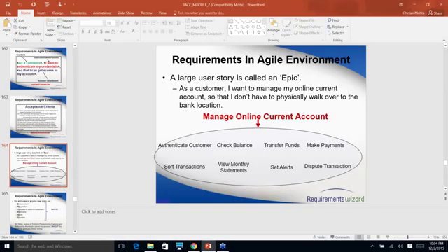So here I'm saying manage online current account. So you can authenticate customer, you can check the balance, transfer funds, make the payments. You can do the sorting, right? You want to sort your transactions based on the dates or based on different types of transactions. All those things you can do. You can view your monthly statements. You can set alerts. So each one will be its own story,